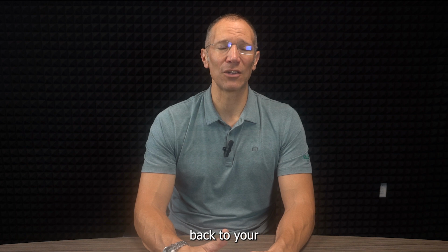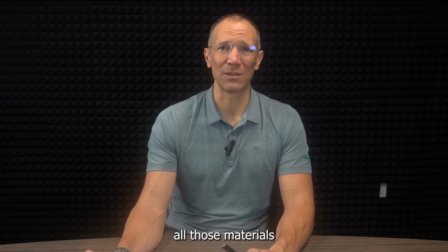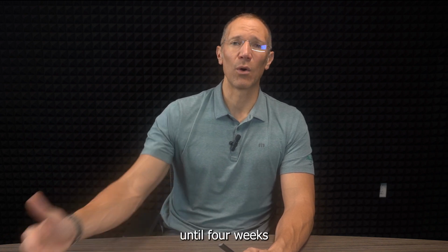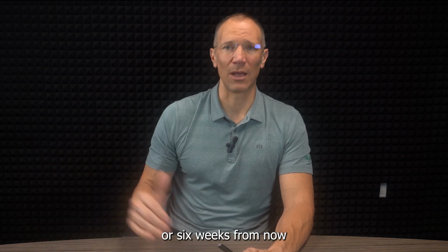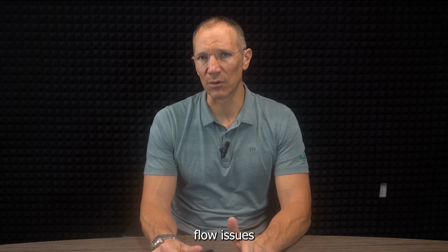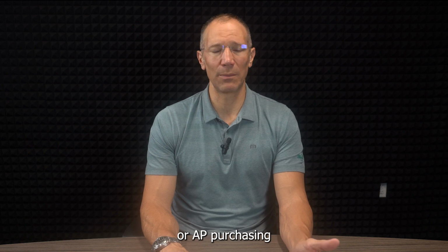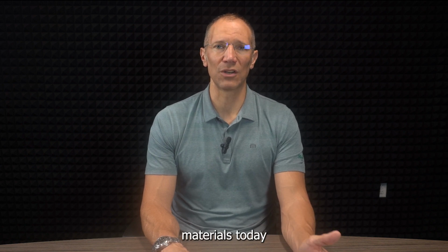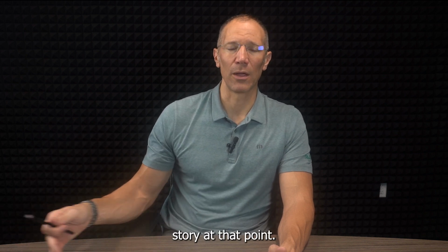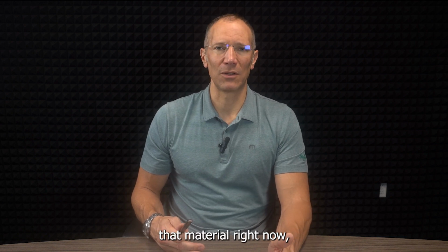That feedback from your project manager is going to let you know, we don't need to order all those materials like we did in the original schedule, because we're not even going to be on that second floor until 4 weeks from now instead of next week, or 6 weeks from now instead of next week. Those are the kinds of things that can really help you prevent cash flow issues and mitigate risk. Whereas if the original budget called for the accounting department or AP purchasing to purchase a bunch of materials today for use in 6 weeks when you'll be on the second story at that point, but there's some structural issue, your project manager can communicate back that they don't need to order that material right now.